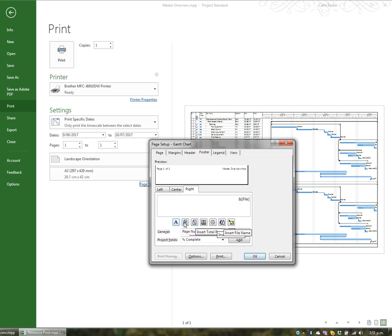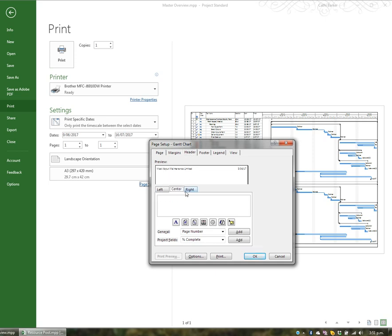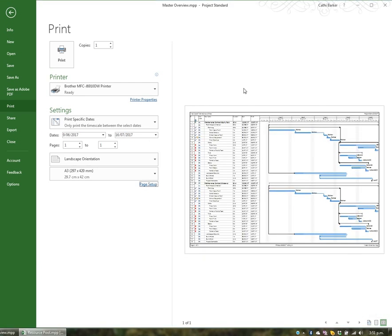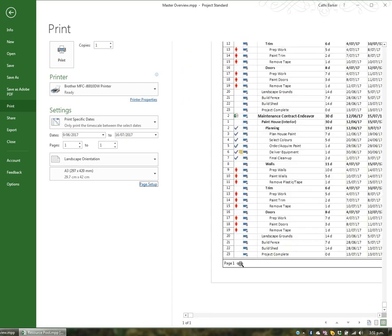You've got a number of buttons here: page number, total number of pages, the date and the time it was printed. In the centre footer I might put 'printed' then insert the date, space, and the time. That appears at the bottom of my page. So I've got the left, centre and right footer, and at the head of my page I've got the left with the company name, nothing in the centre, and on the right I'll add 'project starts' followed by the project start date so readers know what that date is. Clicking OK, those items will appear in the four corners of my printout.